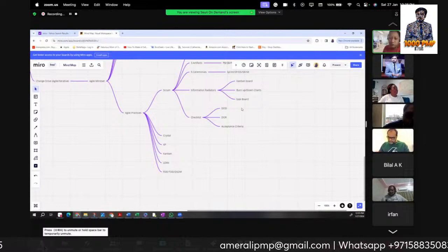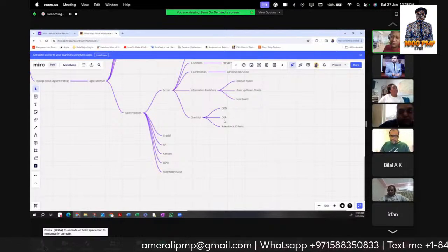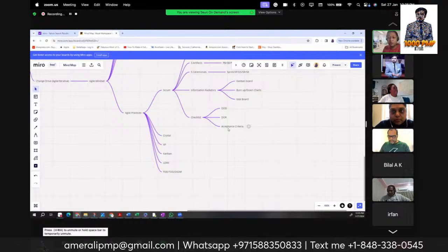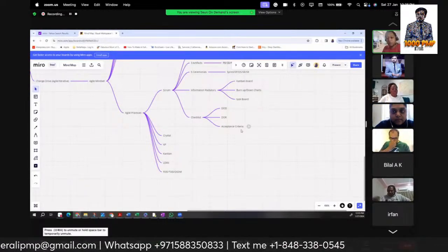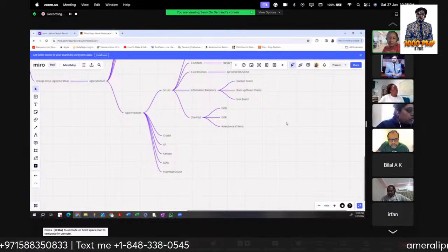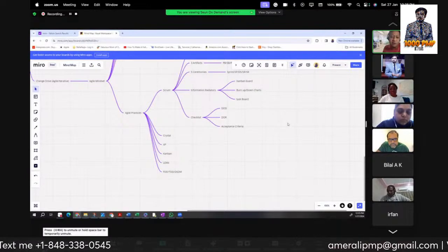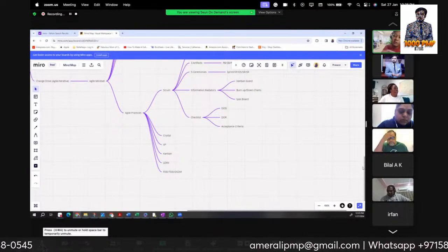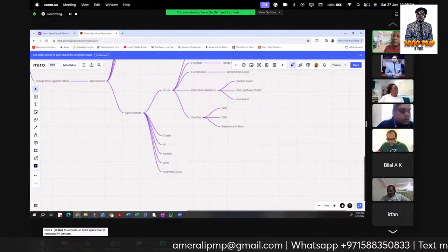story. So when you talk about a user story, we apply 3 checklists there. The definition of ready, whether the story is ready to be taken and worked on. Definition of done, what the developer will do to get it done. And then acceptance criteria, which the product owner will be using to see whether it is done as per plan.